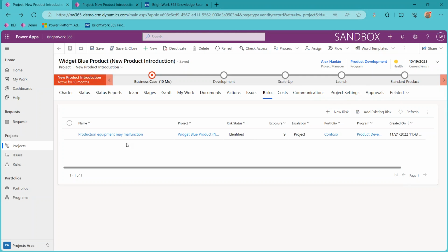So through the risk planning, you jog the memory and shake these things out, and somebody on your team says, hey, you know what? I remember on project ABC, we had a lot of production equipment failures, and that extended the timeline by 2 or 3 months. That's just an example of how after coming up with that risk, you'd probably want to go back to your Gantt and add some sort of a task that accounts for that. Either purchase sufficient warranty, or maybe somehow schedule some on-site technicians to be available during critical stages of the project.